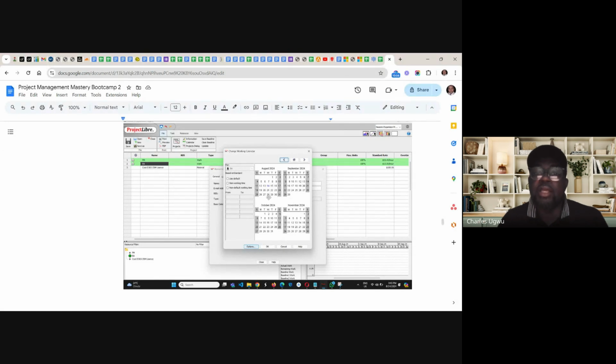You can select days the BA might be going on leave. You highlight the days that this particular professional or resource is going on leave. So mainly, if you want to plan on resources, it means basically when the person will not be available. You need to discuss with the person to find out their availability, when they are going on annual leave or things like that. When you capture that, you can save it, and that's how you can use the calendar to plan for your resources.